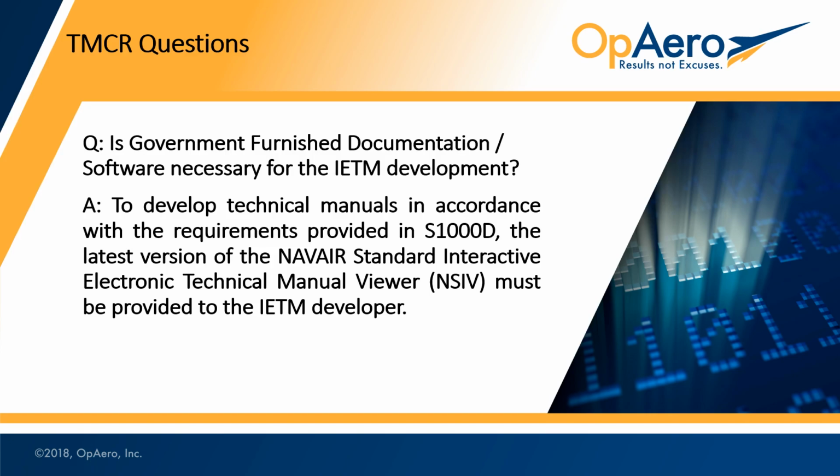Is government furnished documentation or software necessary for the IETM development? Great question. If it's a Navy program, you are probably going to use the NavAir standard IETM viewer. But if it's Air Force, they have their own proprietary viewers. There might be some documentation that you don't have, maybe restricted distribution, that you need to accomplish the project. So this is where you would identify that in the TMCR: any specific software or government furnished information or documentation that would not be readily available unless you were under contract.